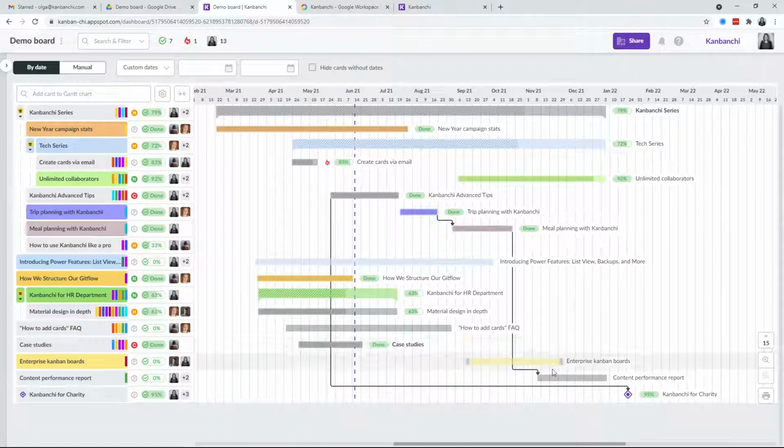For example, I'm planning to start this task a little bit earlier. What I'm doing is just dragging the bar, and you can see how start date and due date is changing. This is really quick and easy. So let me shift it here, and I'm clicking no because I want to move only one task. So you see that the arrow is red now, which means that the dependency is violated, and this is the indicator for me that something is wrong. So my planning is wrong, and I need to start this task a little bit later. Okay, now this is correct.